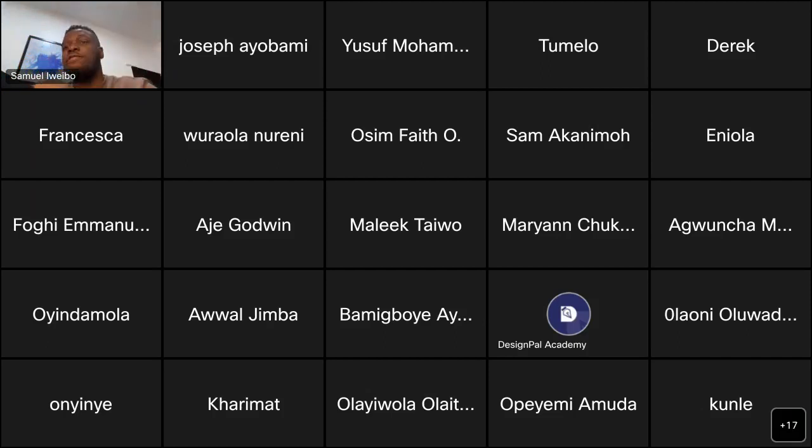So after every discussion, collate feedback, right? So if, for example, you have clients that are sending emails, don't just read emails and screenshot that email. Create a Notion doc based off of feedback and discussion. Screenshot the email, right? Put the email inside that Notion doc. Create a table. Create maybe client's feedback. Copy and paste the text. Screenshot the email again so that it will have the date. Put it in another image of email.